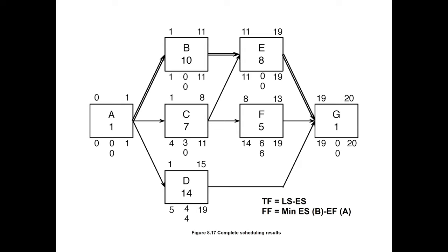Lecture for us: how to draw the arrow diagram and node diagram and how to find the critical path. Okay. So what is important is that we have learned we make the work breakdown structure and durations, then make the links and find the forward pass and backward pass. Like we find the early start and early finish time of all the activities, and then find the late start and late finish time. We do the backward pass, and then we find the total float, and we find the free float also. So when activities have zero total float, they are on the critical path.